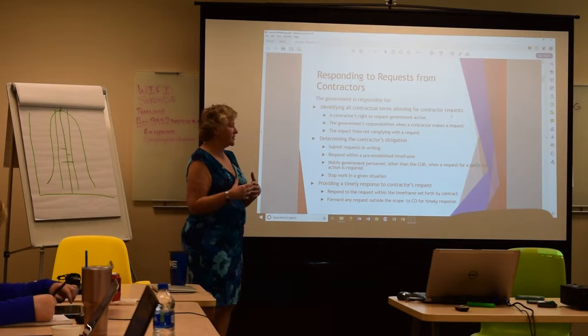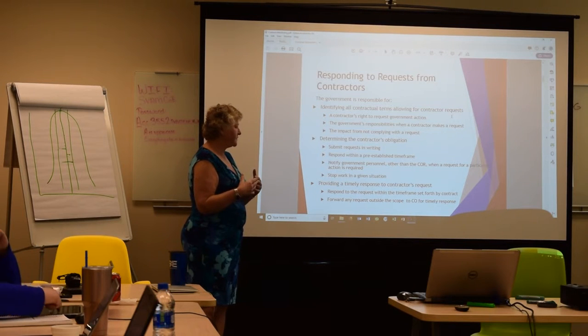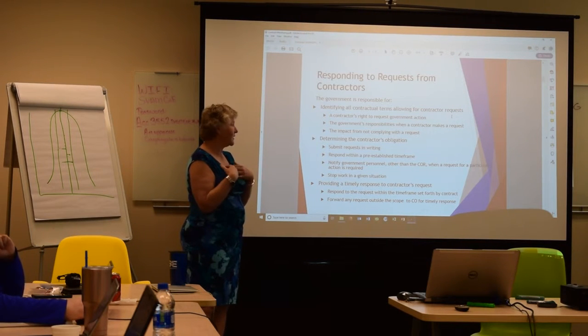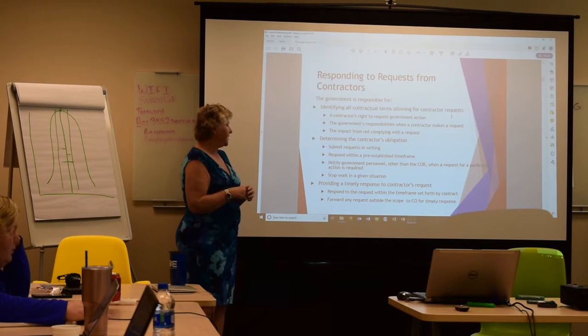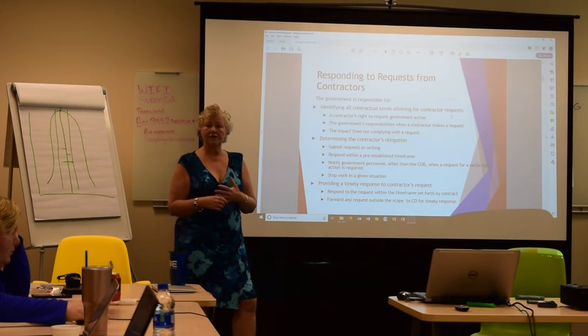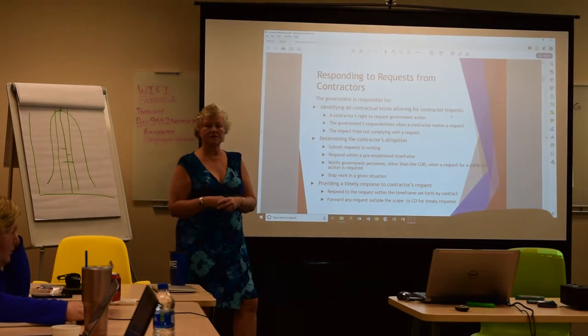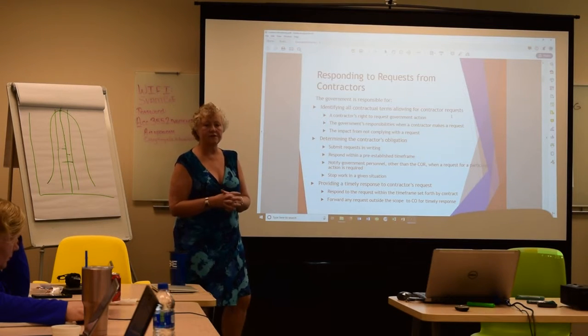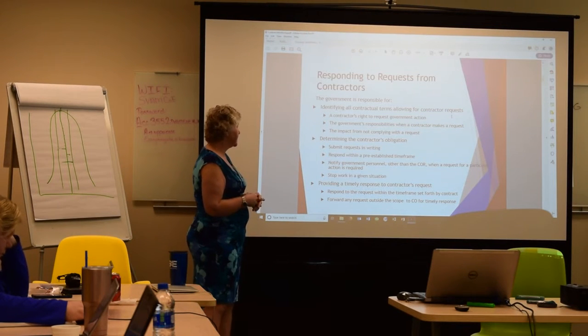The contractor has, the Corps has to document what our obligation is. So we have to submit our requests in writing, and they typically respond within a pre-established timeframe. So when you go to your kickoff meeting, they'll say, we'll respond to any request of yours within 24 hours or 32 hours, or 36 hours.